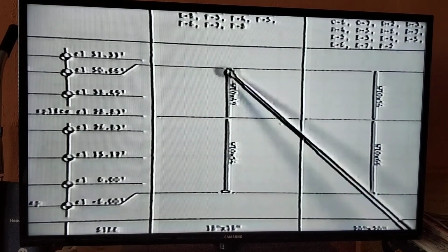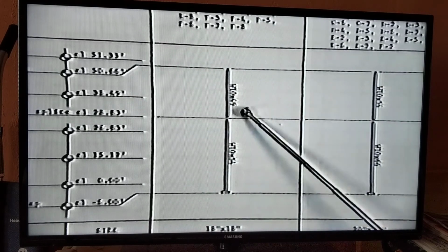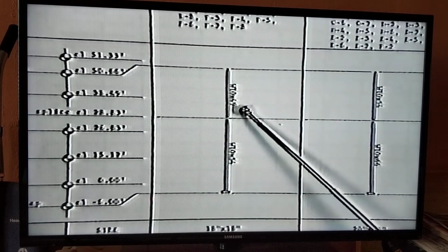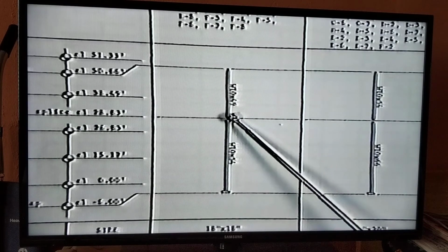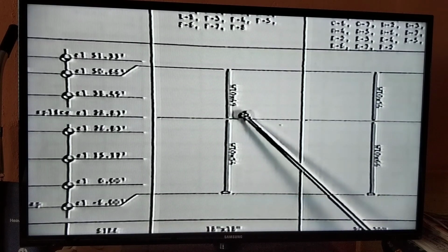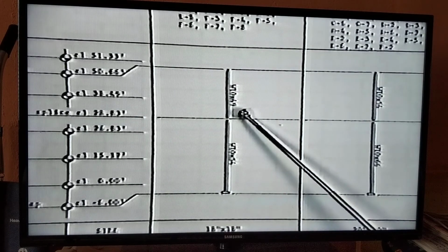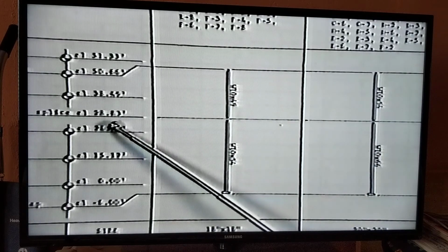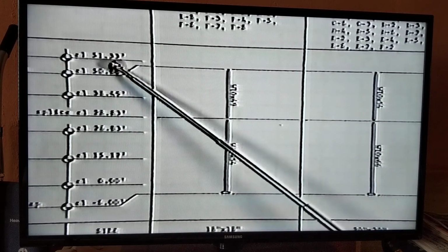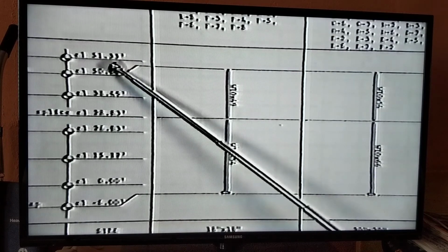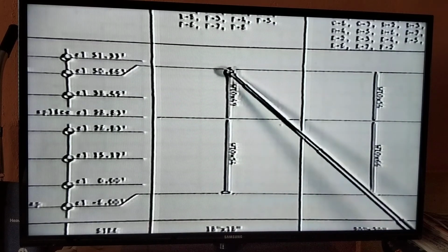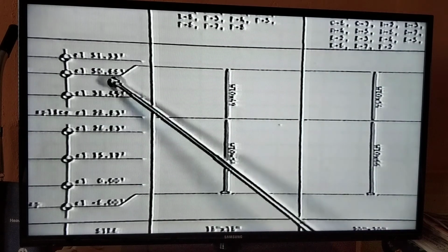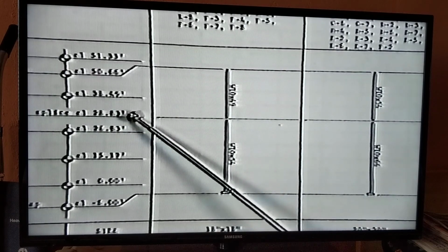And what we need to do would be to find out the weight of each of these pieces. Now, on the W10 by 49, the 49 is significant because it means it weighs 49 pounds per lineal foot. So if we find out what the distance is between here and here, we will find out how much it weighs if we multiply it by 49. We have to be cautious here, however, because we have a splice elevation of 28.83. And at first glance, it may appear that we're going all the way up to 51.33, but we're not. This piece of steel is only extending to the top of the column, which is 50.66. So the distance is going to be the difference between 50.66 and 28.83.